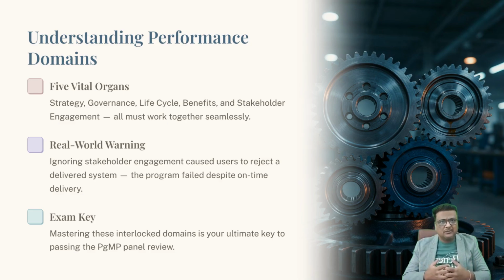I once consulted for an engineering firm where the program manager focused entirely on schedule milestones, completely ignoring stakeholder engagement and benefits realization. Guess what happened? The project outputs were delivered on time, but the users refused to adopt the system because nobody cared about their input. The program failed because only one organ was functioning. Stay with me for a moment because mastering these interlocked domains is your ultimate key to passing the panel review.